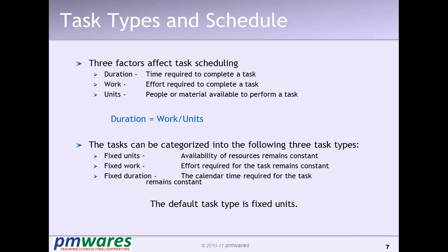Got it? Yeah, okay. So for MS Project to do proper calculations, it should not goof up what we are thinking, so we should accordingly follow those checkboxes. Yeah, if you are estimating in effort, you have to check that box, because you don't want work to get disturbed. But if you change the resources, you want only duration to get changed, not the work, because that is entered by me. That is my estimate. The project should not change that.